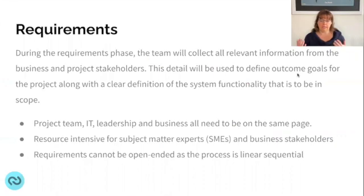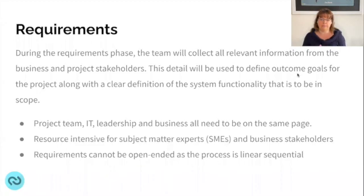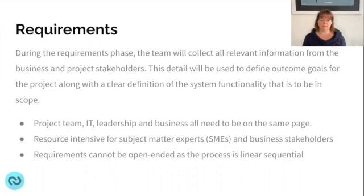In the requirements phase, you collect information from the business and all project stakeholders to define the outcome goals for the project. Have a clear documented intention and clarify what is in scope from both a functionality and purchasing perspective. Project leadership, IT, and business all need to be on the same page — misalignment at the start will cascade into problems later. The requirements must be concrete and defined, not open-ended; if you don't define them here, you'll struggle in the analysis and design phases.